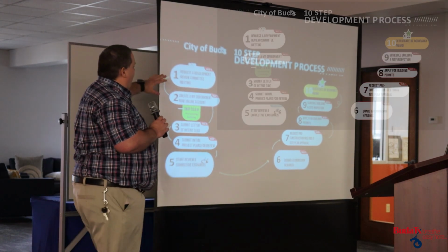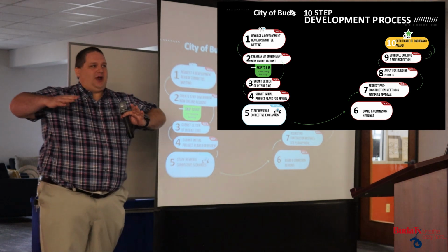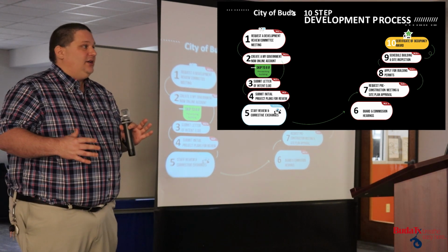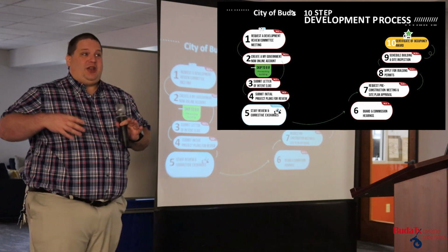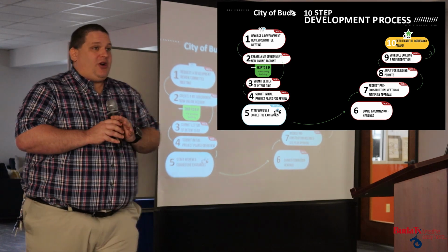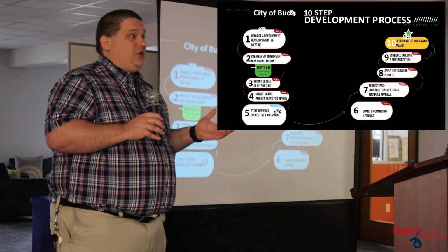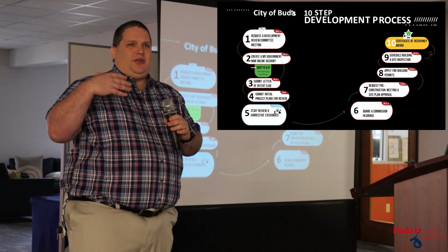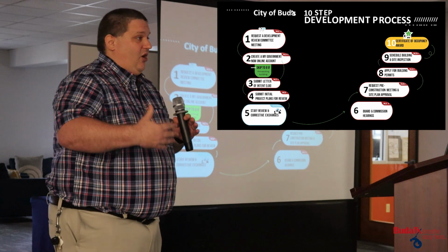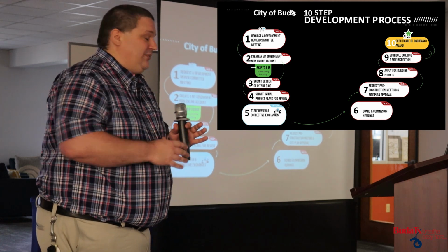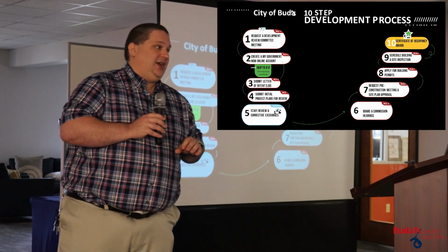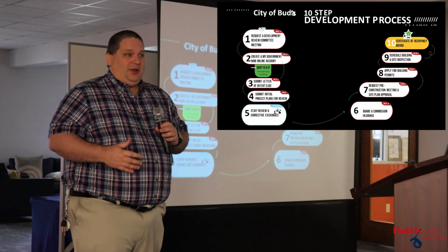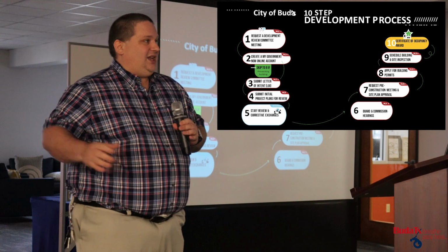So the first thing you want to do after you've found a property you want to move into or a property you want to develop, you're going to get with your professional design team and you're going to schedule a meeting, what we call a DRC or a design review committee meeting. We'll do it either via Microsoft Teams, like an online chat, or we can do it in person at the city, typically held on Thursdays. And you'll actually get to have a meeting with people from our planning team.